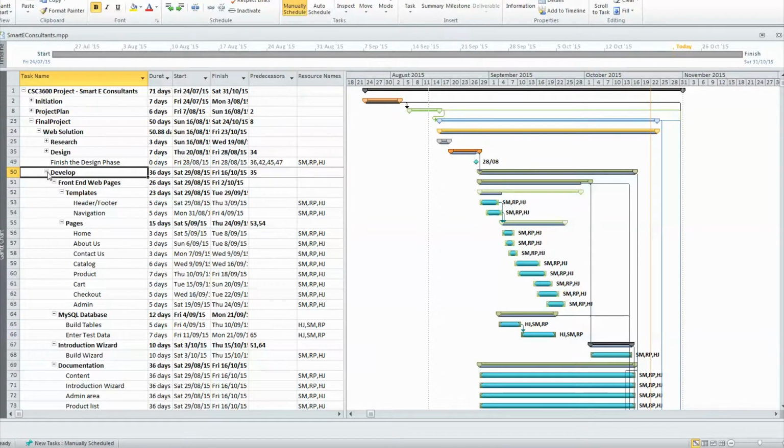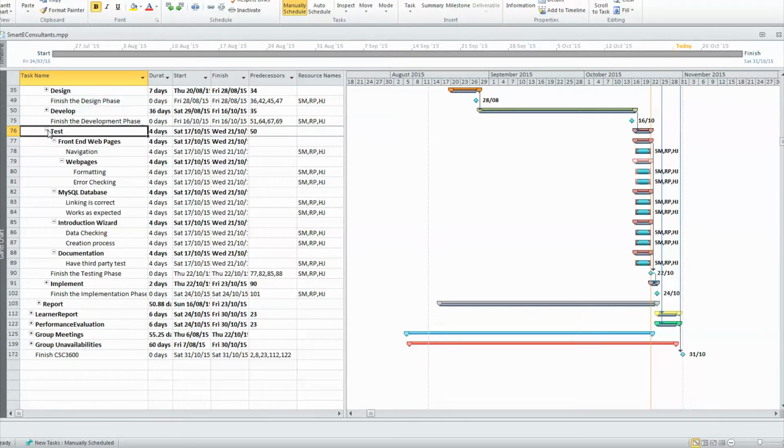The process to have the web solution completed by the scheduled date was delayed, however. Instead of being completed by the 16th of October, it was completed on the 21st of October. The reason for this delay is due to issues encountered with the development environment server, Git, and struggles with Flask and SQL Alchemy. Because of this, the time period to conduct full testing has been limited.